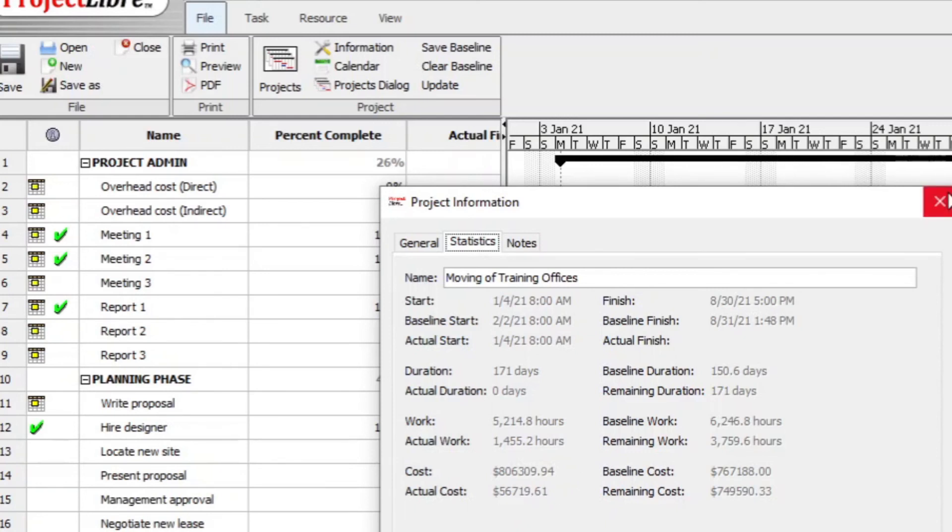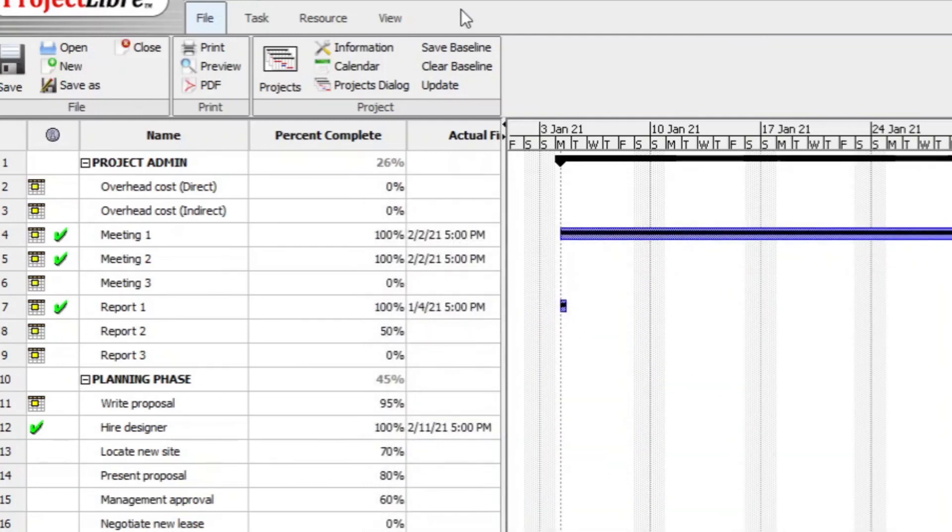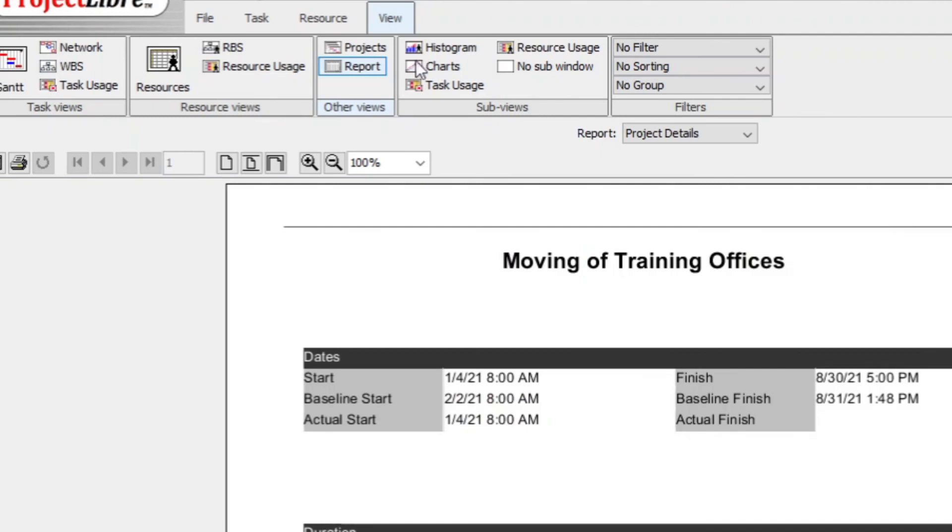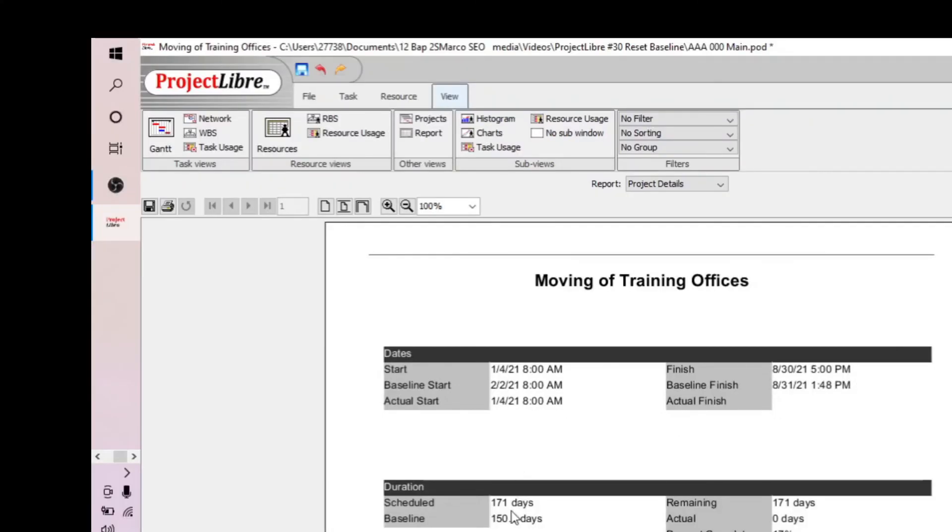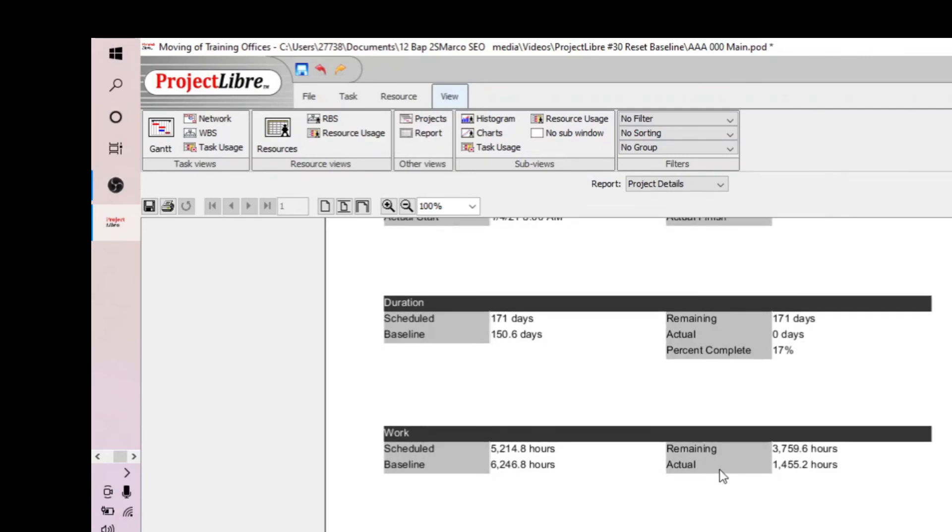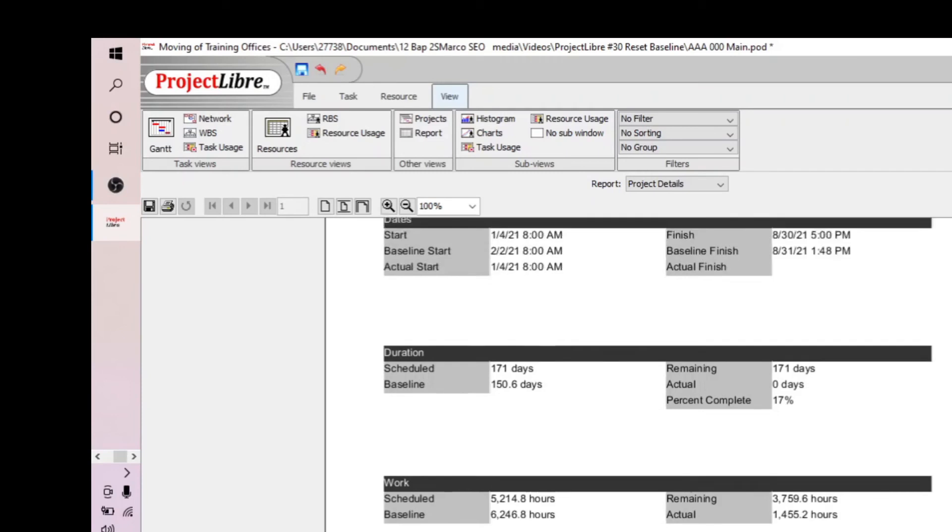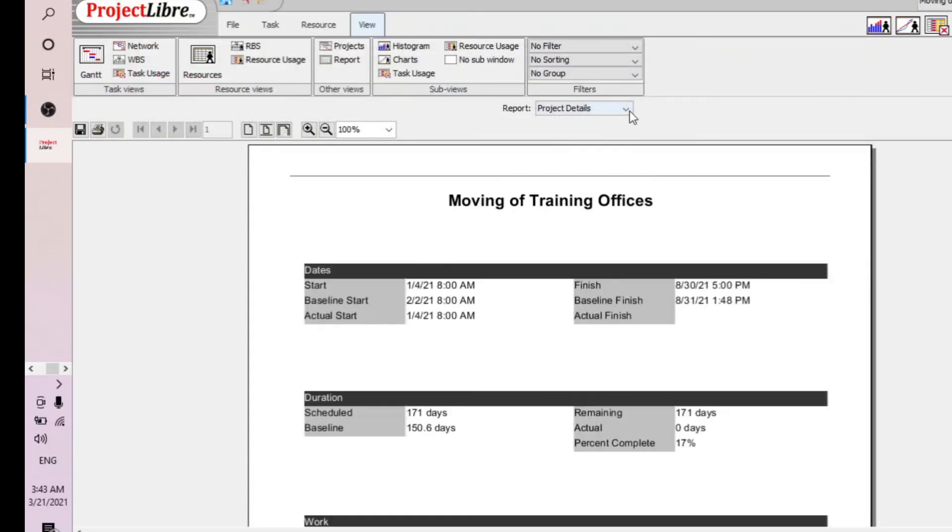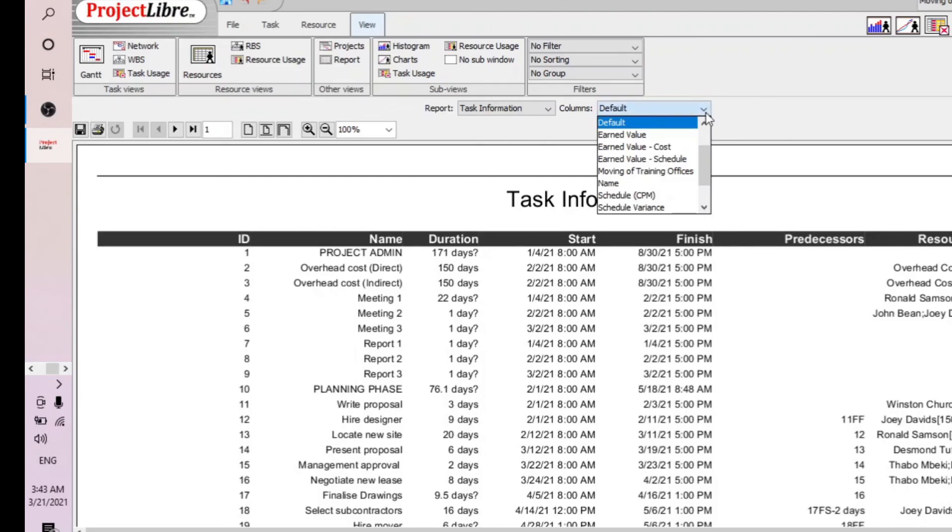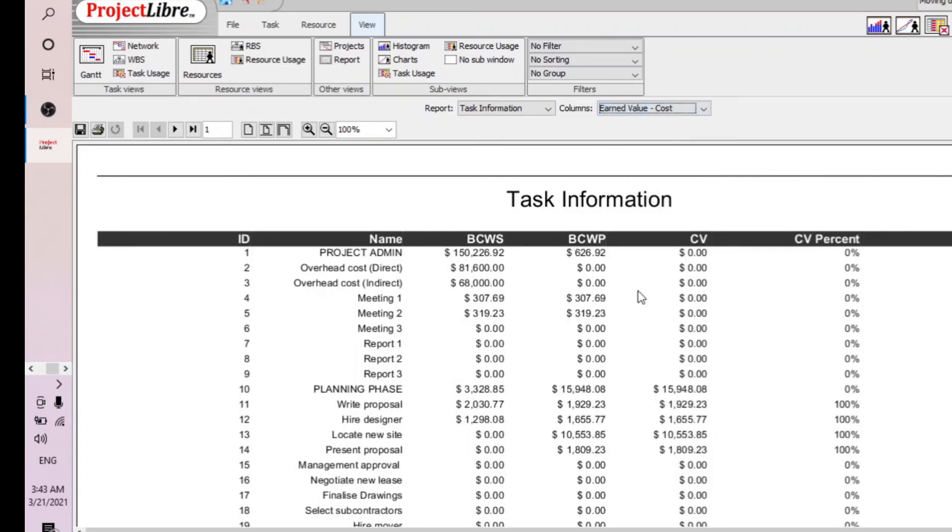You can then also have a breakdown of the costs by going then to the View tab on top here. If you go to the View type, you go then to the Other Views submenu. Click on the Report, you will see the Project Details. Here you see it in the Project Details that the actual work that was percentage-wise completed is 17%. And the actual hours are here that remains and which is actually being done as also the actual cost that was incurred. And if you now go to the Report of the Tasks, the Default Report, you will then have more details regarding the actual variances. If you go to the Cost value, here you see all the data that is being recorded.